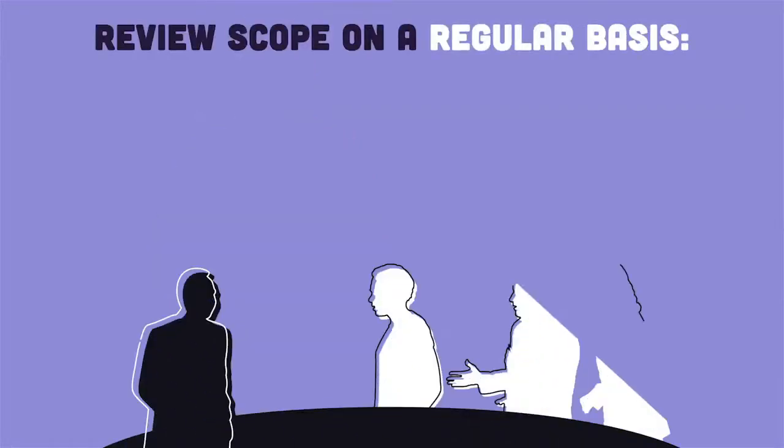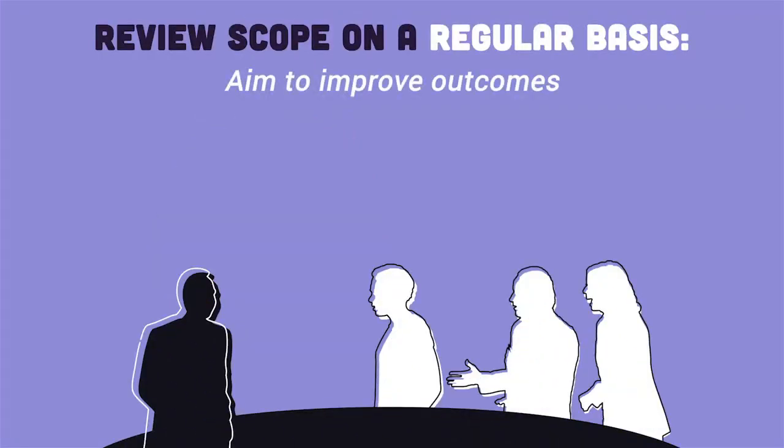What about workshopping the SOW? You can. This can be done prior to or during sourcing with internal and external parties, depending on how much information you want to share. The idea here is to challenge the scope requirements, which can then lead to overall improved outcomes. Say your workshop identifies that because several desks in your office are unattended for days at a time, your cleaners are doing some unnecessary work. The scope can then be reduced, resulting in the same level of cleanliness but at a lower cost.